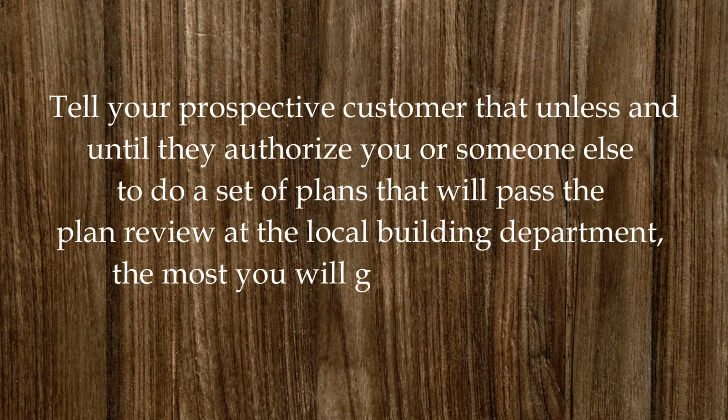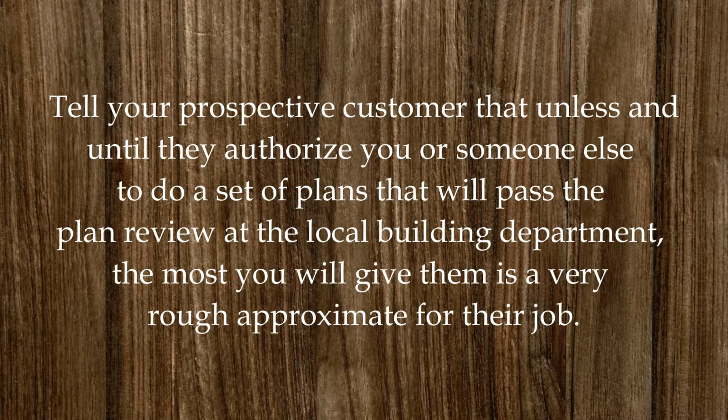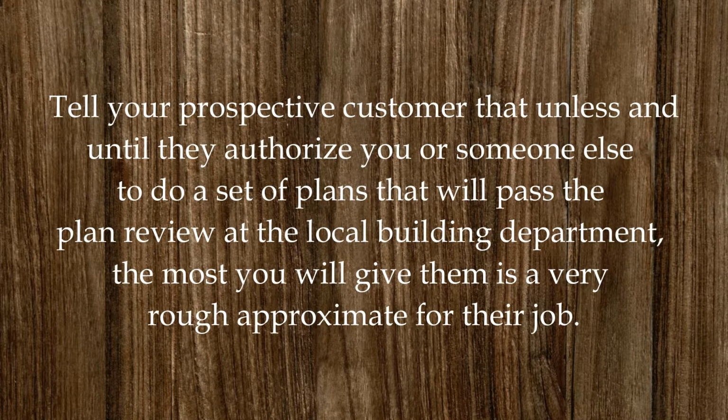Tell your prospective customer that unless and until they authorize you or someone else to do a set of plans that will pass the plan review at the local building department, the most you will give them is a very rough approximate for their job.